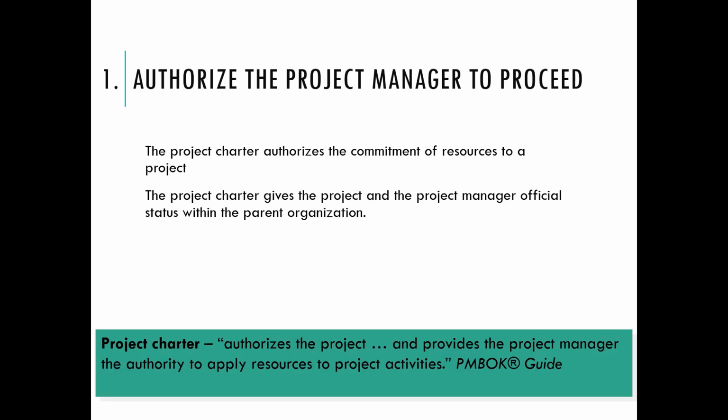Project manager can apply resources into a project and plan the project activities only if a project is authorized. The project charter authorizes the commitment of resources to the project. It also gives the project and the project manager official status within the parent organization.